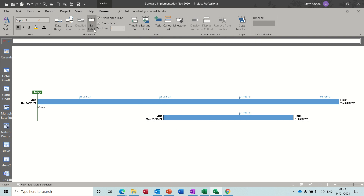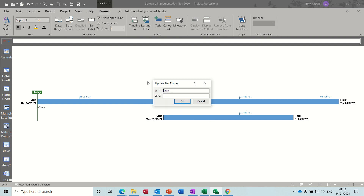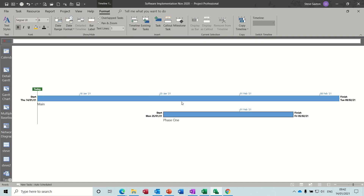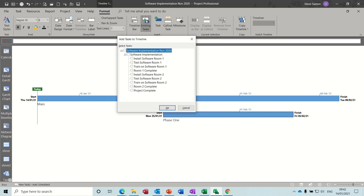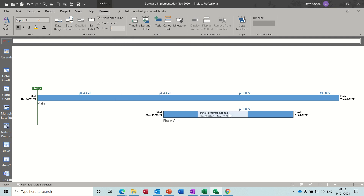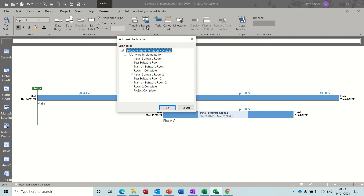I need to label that second bar — say 'Phase One' or 'Phase Two', I'm just making these up. There are no tasks on anything yet, so what you have to do now is click on the 'Existing Tasks' option. Whichever timeline you've got active — I've got this bottom one active — I'll tick a task and it sits right in the middle. I'll do the same for another one.